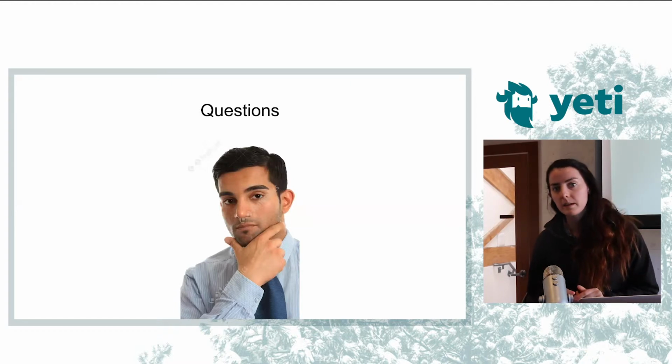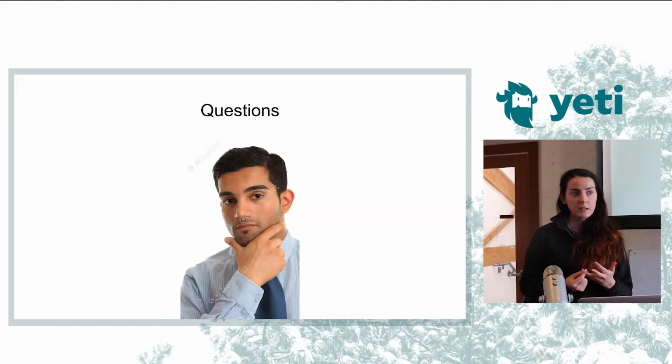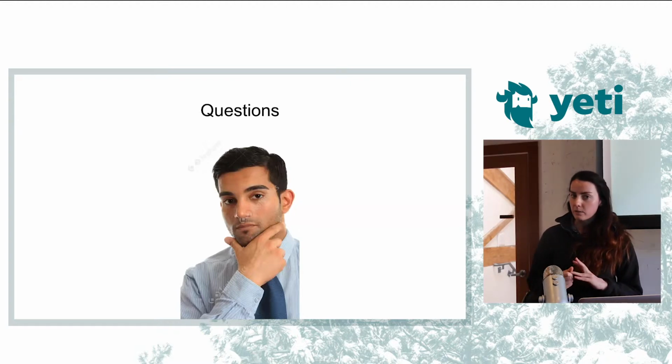Yeah, so I think a big part of that is the post-it generation, because everyone does that in a silo by themselves. And then something that I've been trying to do more is to have, rather than dot voting on post-its, just calling on each person to pick a topic that they want to talk about. I'm hoping that is helping to get people who maybe don't feel like they are as opinionated or would hold back normally to at least choose a topic that interests them the most. Whether or not that's actually the most important topic for the group to be talking about doesn't matter at that point, because usually there's only a couple of them that are really, really important. And so I think everyone having a voice is almost more important.